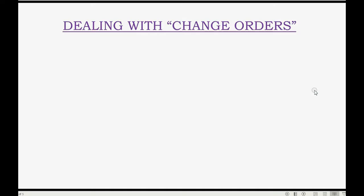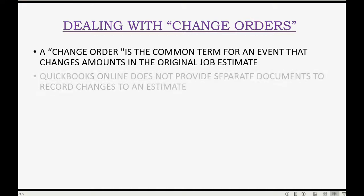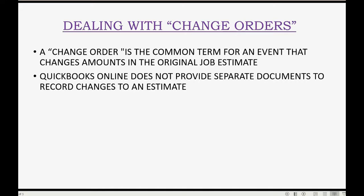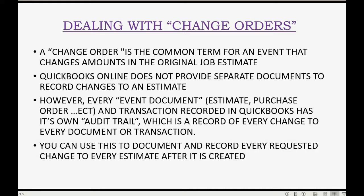When dealing with changes to an original estimate or contract, you should know that a change order is a common term for an event that changes amounts in the original job estimate. QuickBooks Online does not provide separate documents to record changes to an estimate. However, every event document like an estimate or a purchase order, and every transaction recorded in QuickBooks, has its own audit trail, which is a record of every change to that document or transaction. You can use this audit trail to document and record every requested change to every estimate after it is created.